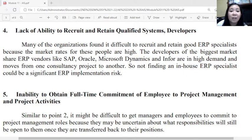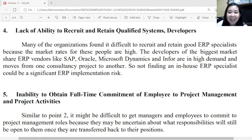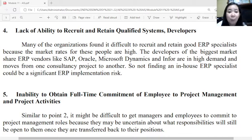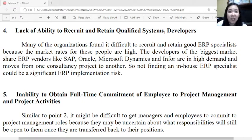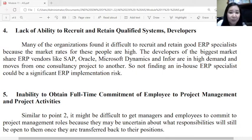The fourth risk is lack of ability to recruit and retain qualified systems developers. Many organizations find it difficult to recruit and retain good ERP specialists because they are high-paying and in high demand. Developers for major ERP vendors like SAP, Oracle, Microsoft Dynamics, and Infor move from one consultancy project to another. Not finding an in-house ERP specialist is a significant risk — if the software crashes or technical errors exist, there may be no one to resolve such problems.